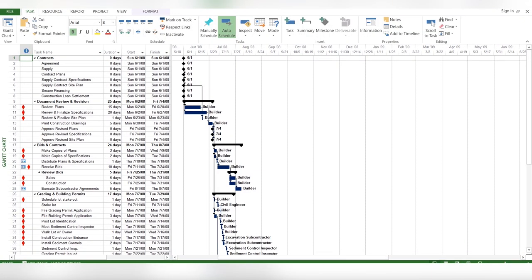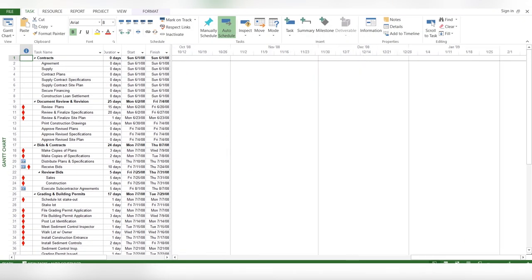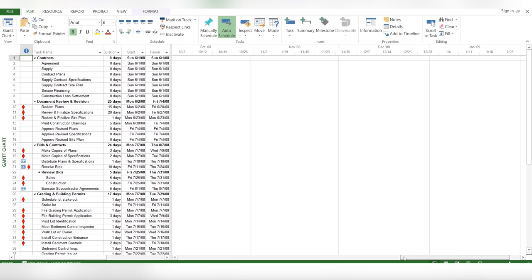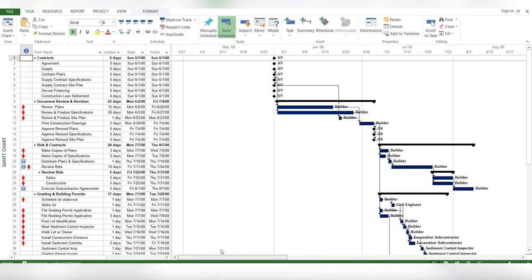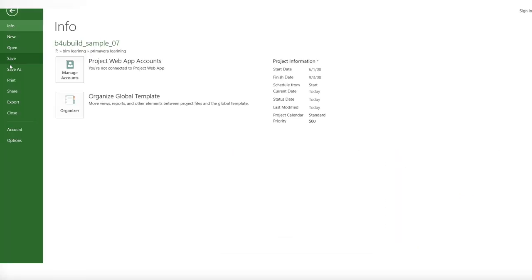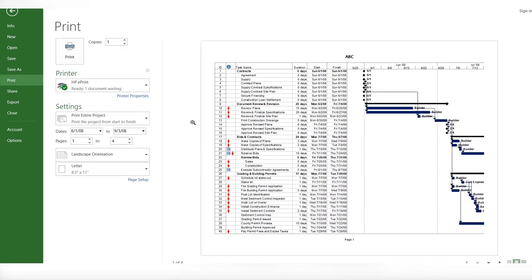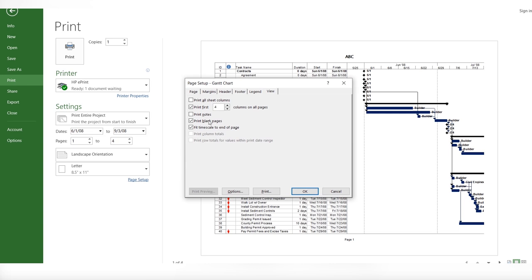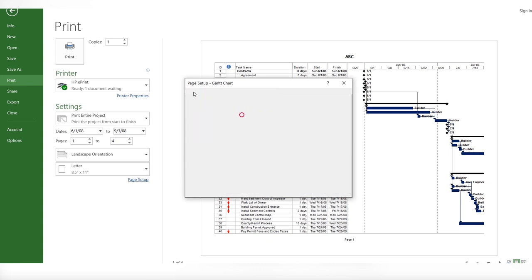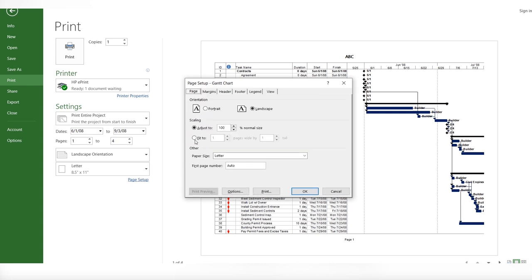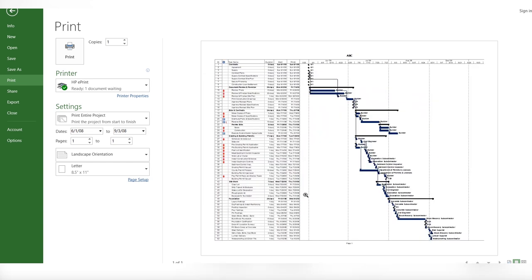Now you can also print out with a single click. Now I am changing back into the detail information. Now I am going to print out again, and now I will go to page setup. And from the page I will change to fit to one page only, and you will see when I click OK, I will get only one page. This is the page you can see.